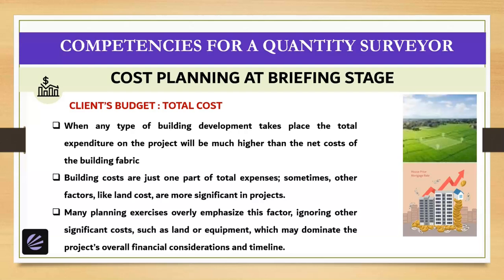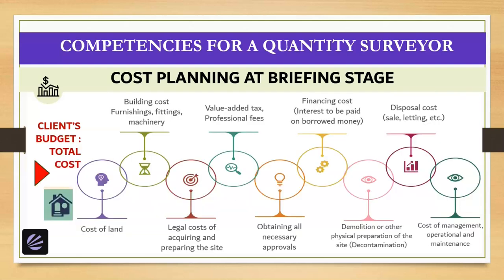Sometimes other factors like land costs are more significant in projects. Many planning exercises overly emphasize building costs, ignoring other significant costs such as land or equipment, which may dominate the project's overall financial considerations and timeline.